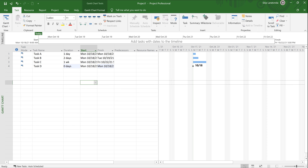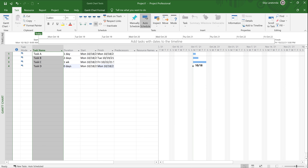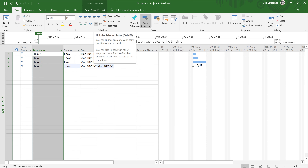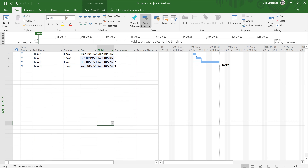If you type a start date or put in a finish date, you take all the dynamics out of Project — do not do that. There's a time to do it, but it should be the exception and not the rule. The next thing is to select all the tasks — just like in Excel, click the heading — and click the link task button. When you click it, it throws all the tasks out to the right in a finish-to-start relationship and puts predecessors in the predecessor column.